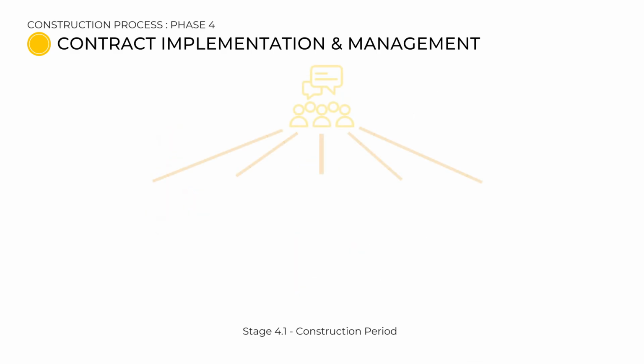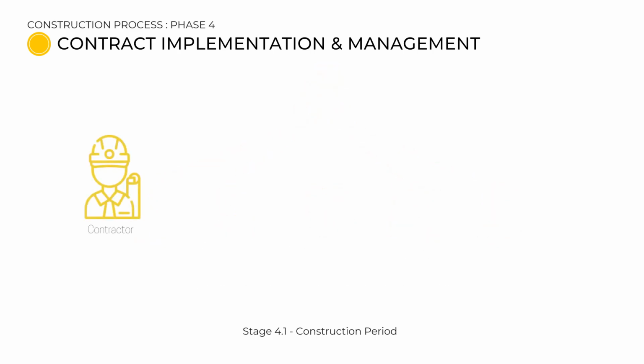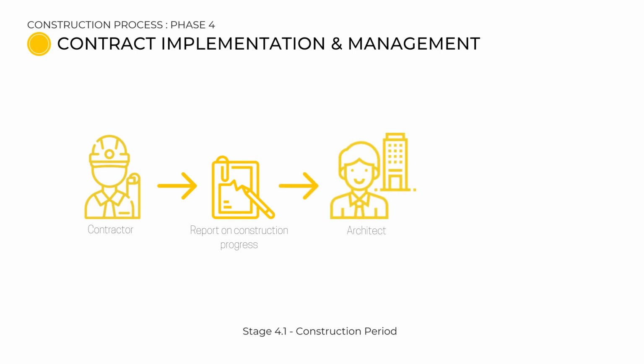Site meetings are held periodically with all involved parties to update the client on the subcontractor's work progress. The contractor makes a construction progress report to submit to the architect. It will be passed on to the client once satisfied.